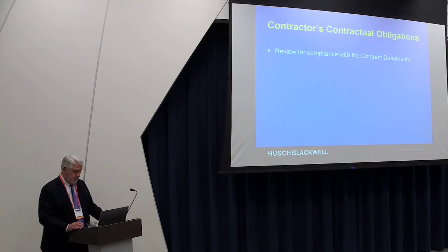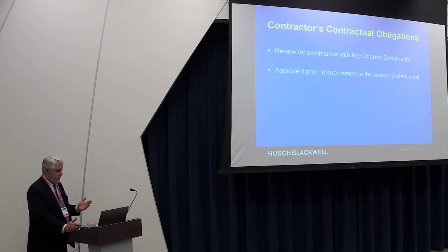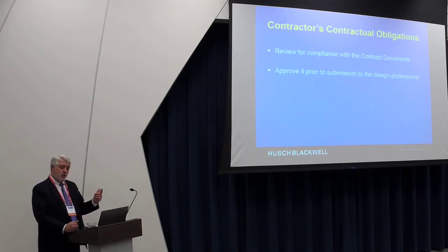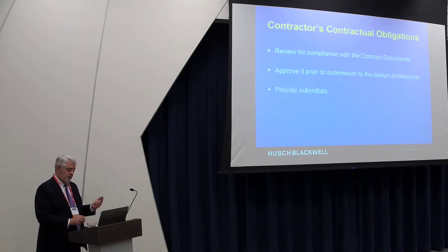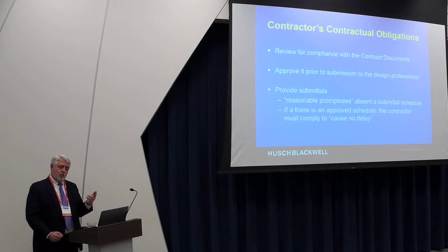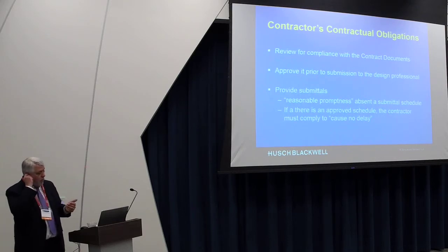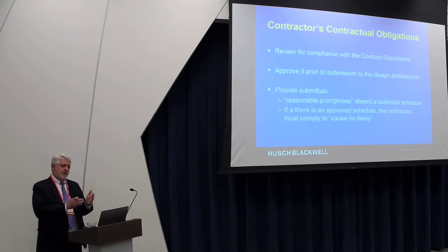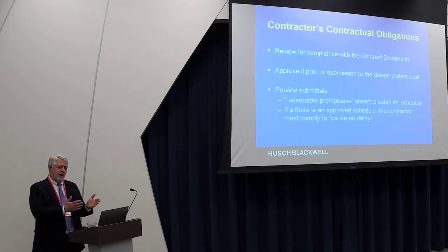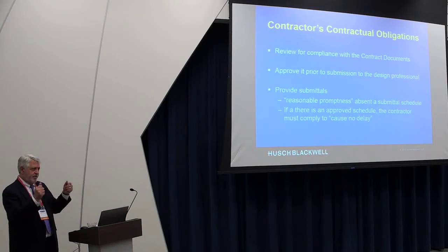When the contractor sends in his submittals, first of all, it's an affirmative representation by the contractor that he reviewed these submittals for compliance with the contract documents, that he approved these submittals before he submitted them to the design professional. And he also has to either comply with the schedule in the contract or submit in a reasonable amount of time. But why is this review and approval important? It's maybe a little belt and suspenders, but it's an affirmative representation by the contractor that I understand what your design is telling me to do, and that's what I'm going to do on this project. Not only did I sign a contract that said I'm going to do that, but I've worked through it, and here's my communication setting out that this is what I'm going to do.